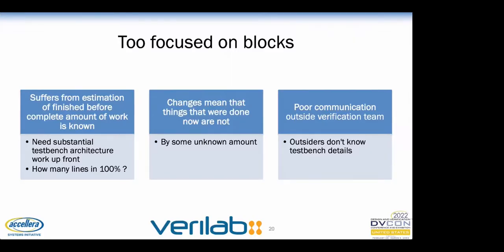We can't develop a single test bench block by itself. They need the blocks that they interact with to progress along at a similar rate. If there are more blocks than engineers, then partly finished blocks need to be left in order to work on other test bench components. None of the blocks can be truly 100% finished until all the blocks that they rely on are also 100% finished.